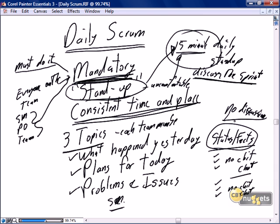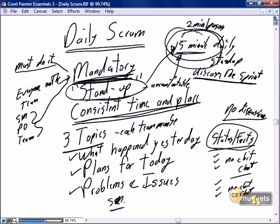As soon as two team members begin a dialogue, it's not relevant for the daily scrum. Ask them to take it offline. If you very strenuously apply those rules, you're going to get through your 15 minutes. Remember, we only have five to seven team members. If there are seven people, we're going to get this done in 15 minutes — that's two minutes per person. They really don't have time for more than listing which stories they worked on and what they plan to do today.